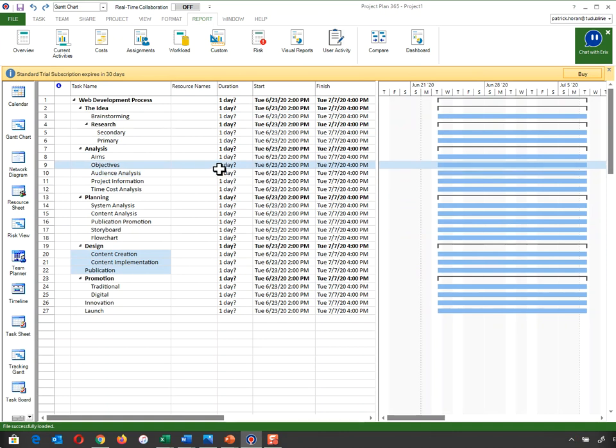Okay, so my durations at the moment, all my durations are in as 1 day with a question mark. And the question mark at this point in time means it's an estimated time. So it really means that that's been put in by the computer rather than us. So what we need to then do is go down through it and figure out what are micro level items, and what time we're going to spend, or we think we're going to spend, on each of those items.